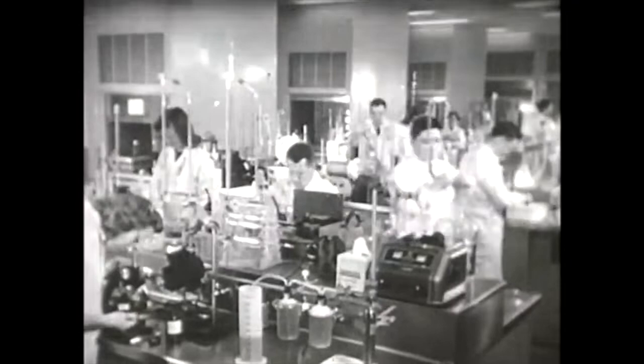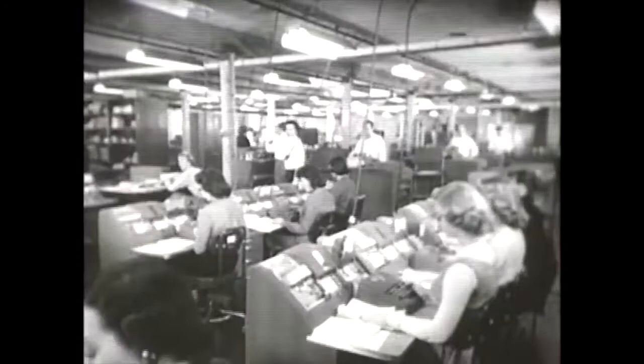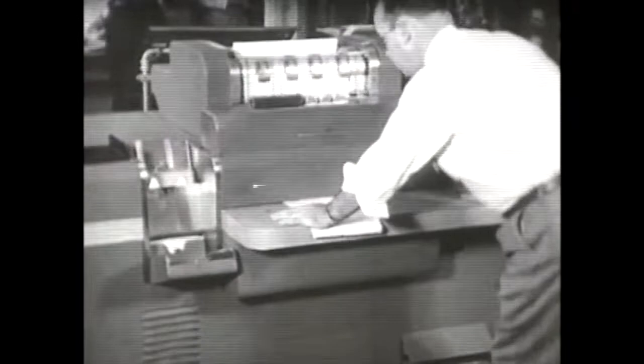About 2,600 workers are needed on the permanent staff. And so, as the water vapor rises in the sky, indicating the Portsmouth plant is on stream, let's summarize some of the accomplishments on the project. Two are of particular significance. First, completion of the plant several months ahead of schedule. And second, achieving a saving of about 34% below cost estimates, a cash saving of approximately $400 million.